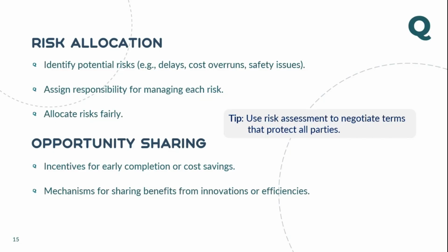There is delay damage. If I delay the project, I'm going to pay damages. So how can I recover that? All these kinds of risks you are going to identify and plot in your contract. You also categorize the risk based on severity and types of occurrence, and you also mention the mitigation, how I'm going to mitigate. Similarly, your opportunities.